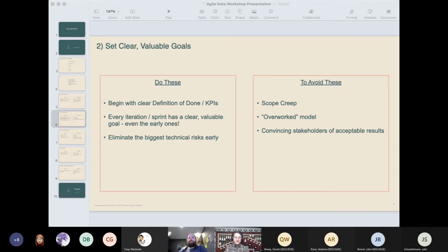When I have a choice. Sometimes you don't have a choice. You might also be dealing with a brand new team that's never worked together before. And in your first sprint, it might be a good idea to give them an easy win. And say, all right, folks, it's our first time ever working together. I just met you 5 minutes ago. Let's pick a goal that's super achievable that we can knock out for 2 weeks. And that'll give us a good solid start. We can get to know each other a little bit, and that will set the stage for the 6 months that we know is going to follow. But there's obviously judgment calls involved there. But when I have a choice, I always go for value.